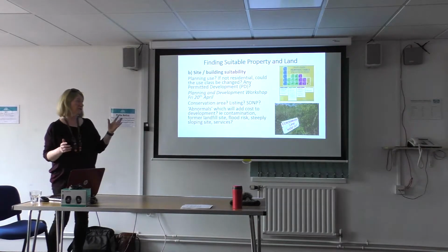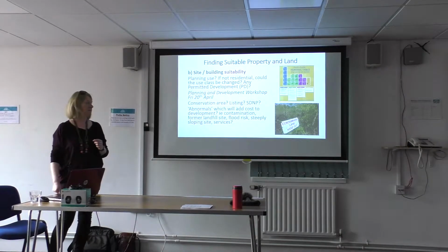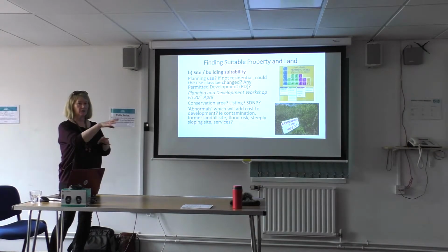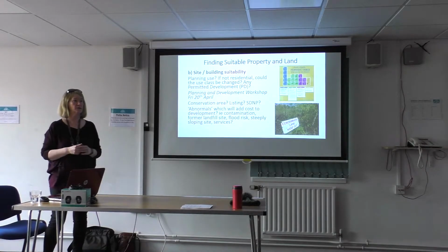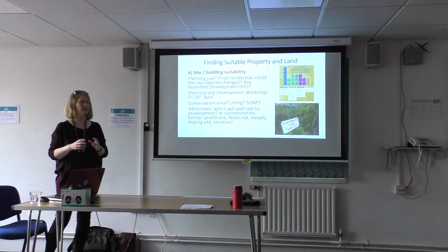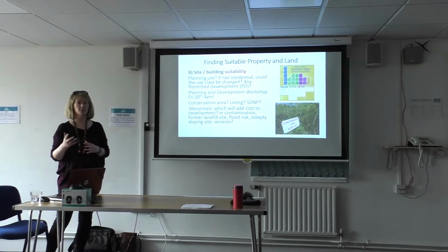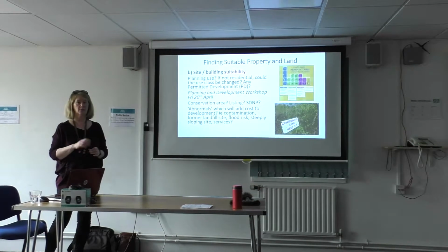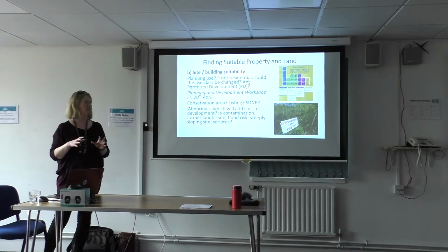There's quite a lot of former landfill sites around East Brighton, of course. They could just keep moving the dump around. So there's some land there, but it's potentially got methane associated with it and is quite dangerous. So there's quite a lot of work to do in getting that land fit. On the Environment Agency's website about flood risk, there's a map of areas at risk of flooding.